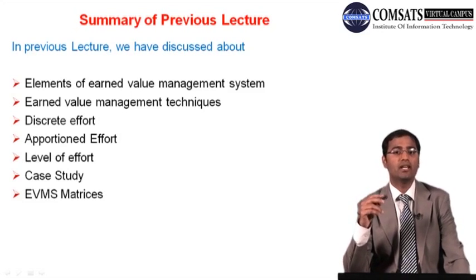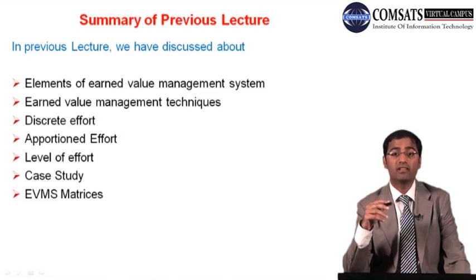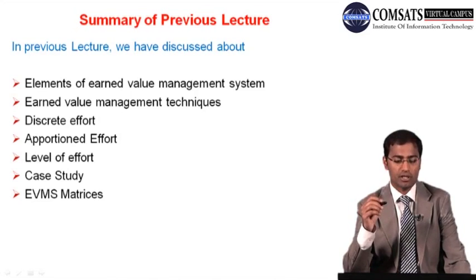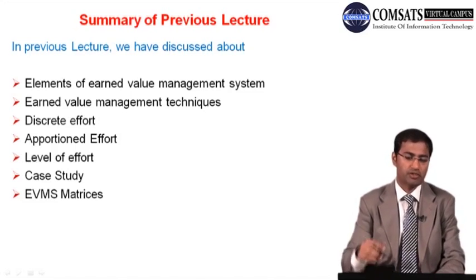If SPI and CPI are equal to 1, our project is on time and on budget. And if SPI and CPI are greater than 1, we are ahead of schedule and below budget. Okay, so these concepts were discussed in that part of the presentation.